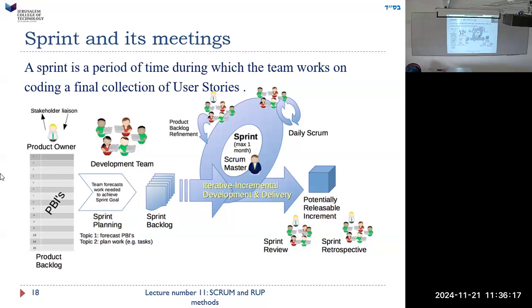Or I don't know when we're gonna do that, because the truth is we could do it for products that are not even in the sprint. We can do it for all the products. I don't know how much time you want to spend on that. You could spend years just listing and prioritizing all the product backlog items without ever doing any work. So I don't know how much you can do that, but sprint backlog. So this creates a sprint backlog, which is all the items that I want to do in this sprint. And then the sprint is maximum 1 month.